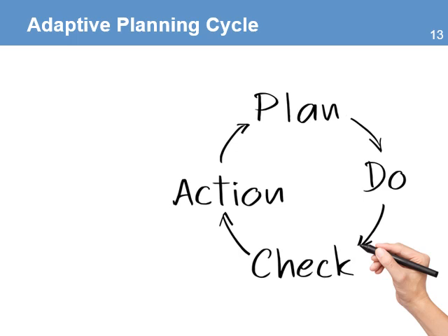After you complete the plans for the first phase, you move to the implementation phase where you do the work, you check the progress, you try to see the variances between what you planned and what the results are. With that information, you act. You adapt the plans to improve them, so that in the next phase, you incorporate those lessons. You incorporate what you have learned, and you improve your plans so that they reflect the changes in the context.